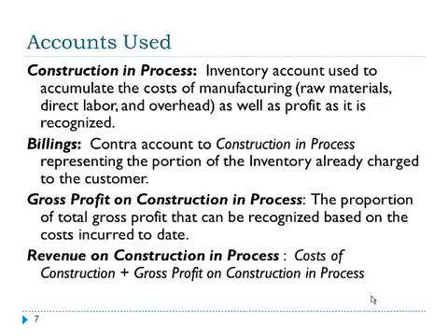But there's going to be something distinctive here, because when profit is recognized during production, it triggers a revaluation of inventory, and the profit that's recognized on the income statement, in double entry accounting, an increase in a credit, also has to increase some debit. Well, the debit that it increases is the value of the inventory. So as revenue is recognized, that profit increases the inventory account.